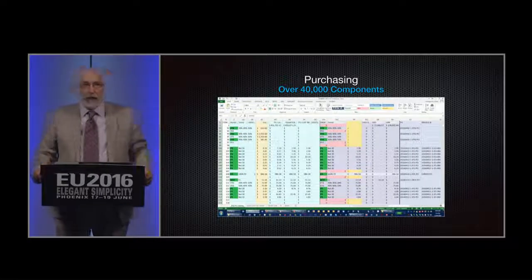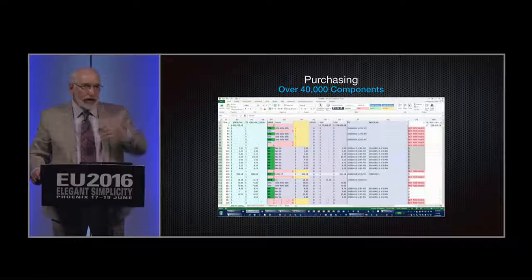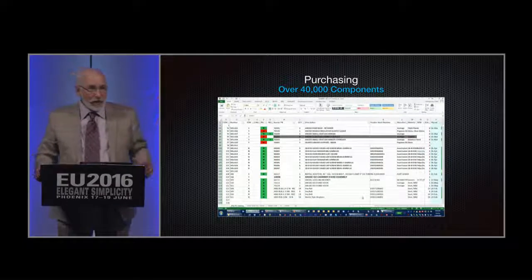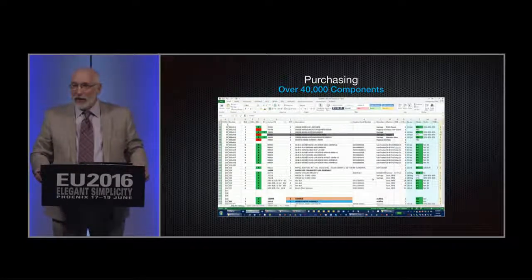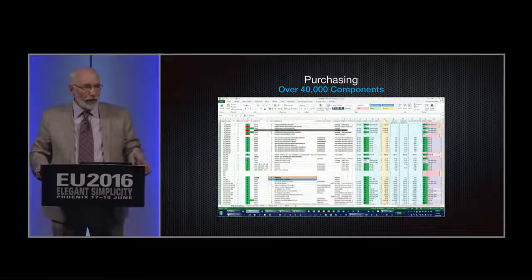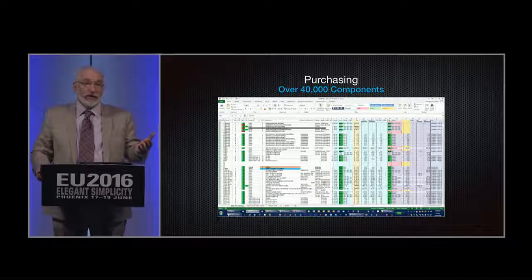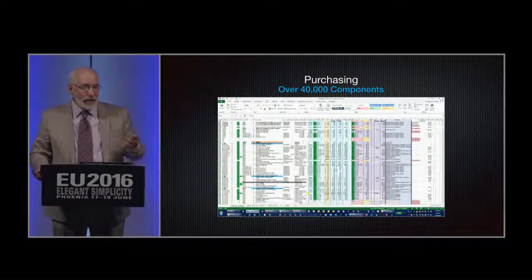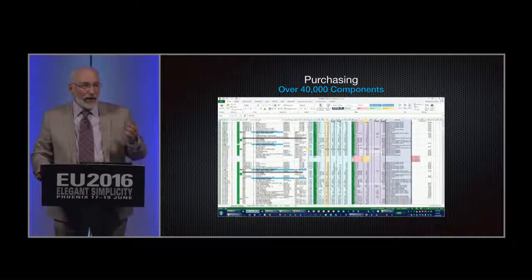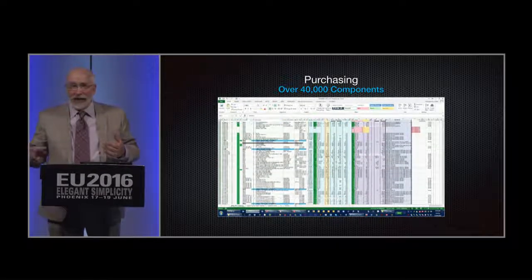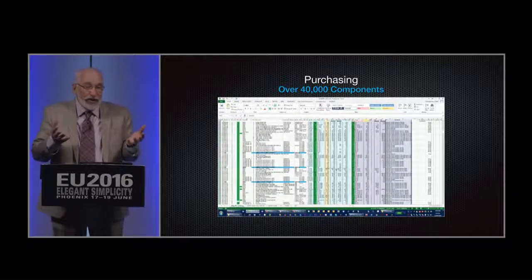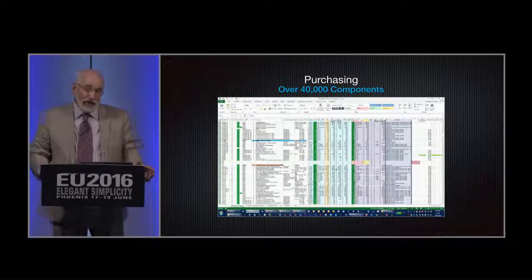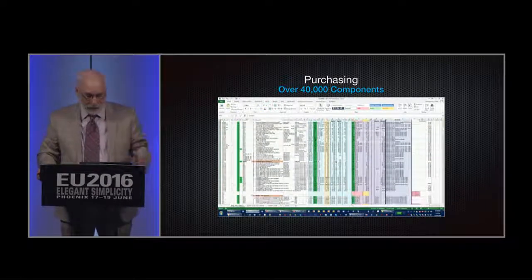And I asked Jano last year if he'd be interested in helping me out on the purchasing side of things, and he's never done it before. I have a lot of experience in this from my other companies. He thought maybe it's calling the company up and saying, I'd like to buy this part. Well, what he discovered, and what I didn't tell him, is there are this many pieces, and you have to identify who the vendor is, the lead times, pricing, get quotes, and follow up, and when the part is going to hit the floor. And you really have to take the view that the vendor's not really going to tell you the truth about the price or delivery, and they're not going to deliver on time, and when they do, it may not even be the right part.